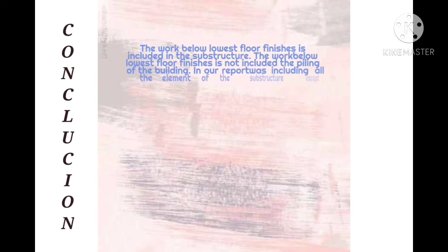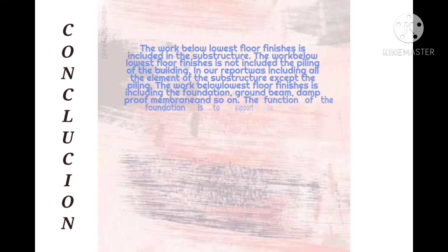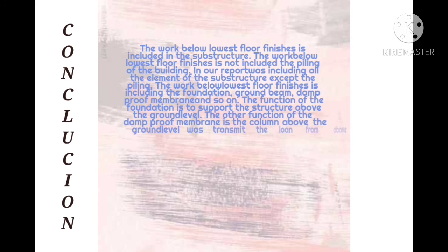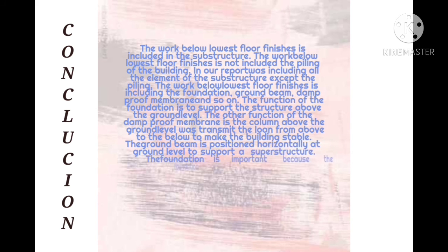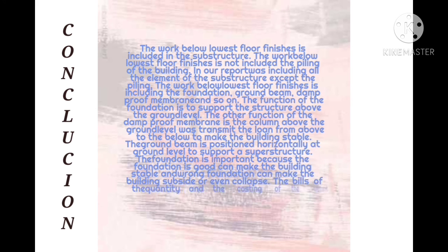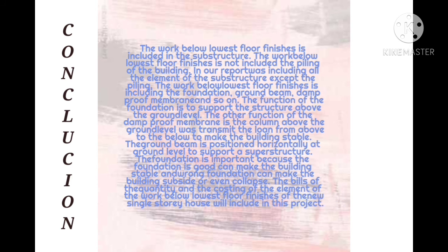The work below lowest floor finishes is included in the substructure. The work below lowest floor finishes does not include the piling of the building. Thus, our project report includes all the elements of the substructure except the piling. The work below lowest floor finishes includes the foundation, ground beam, damp-proof membrane and so on.